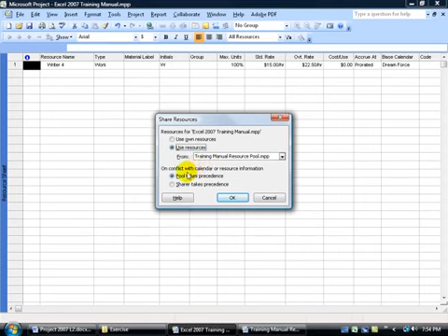And then down below, by the way, it says on conflict with calendar or resource information, either the pool is going to take precedence or the sharer. In other words, when you're sharing resources back and forth with all these other projects, and let's say there's a conflict, like with what you have in your calendar with what the pool is linking out to all these other projects, do you want to take precedence over the pool, or do you want the pool to take precedence? I recommend the pool because that's where you're going to make your changes and have it trickle down to all the projects, unless you're kind of stubborn and your project is the only one that really matters, and so yours will always take precedence or overwrite the pool.